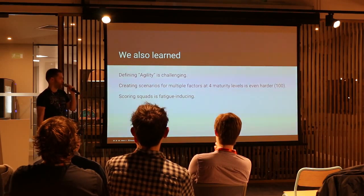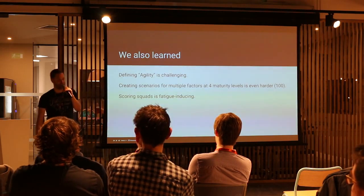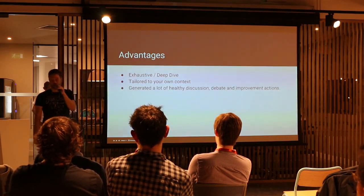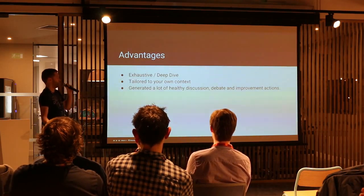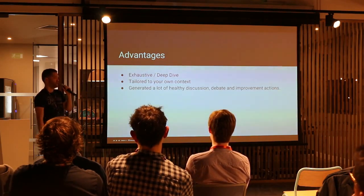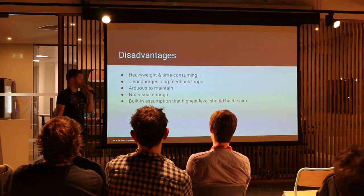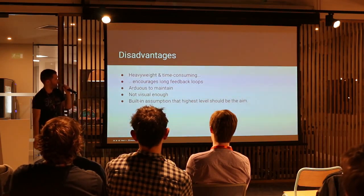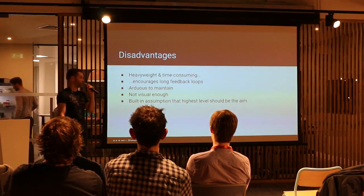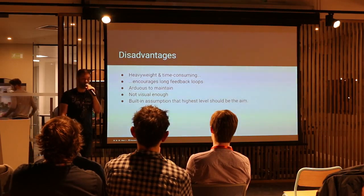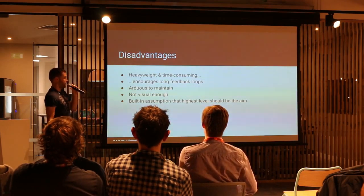As a result, scoring the squads was quite a fatigue-inducing thing. As my colleague Ash will attest to, these kind of sessions can last about an hour and a half sometimes. The advantages of this maturity model: it's exhaustive, it's a deep dive, it's tailored to your own particular context, and it generated a lot of healthy discussion, debate, and improvement actions. The big downside is that it was too heavyweight and time-consuming. As a result, it encourages long feedback loops, so you could see whether or not the interventions you make have actually had any impact. It's also hard to maintain and not particularly visual in its output — it's not the kind of thing you can print out as a big spreadsheet, put on the wall, and have be meaningful to all your stakeholders. And there's also the built-in assumption that, given it's a maturity model with four levels, you should always strive to achieve the highest level in each — which is not actually possible.